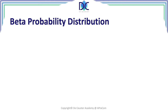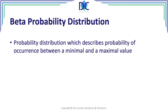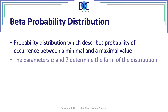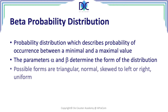We also have the beta probability distribution. This is the distribution giving the probability of occurrence between a minimum and a maximum value. Where the normal distribution goes from minus infinity to plus infinity, the beta distribution is limited between a minimum and a maximum. It contains two form factors, alpha and beta, and depending on their values, the beta distribution can take different forms — including triangular, normal-like, skewed left or right, or even a uniform distribution.